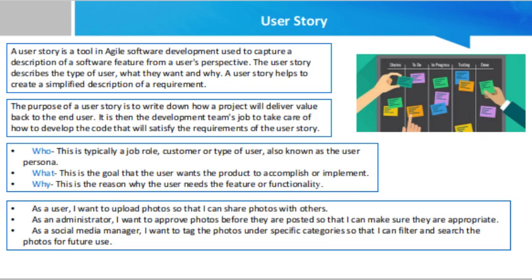What is a good user story? First, a good story is independent — you want user stories to be independent of each other so you can freely move them around your product backlog as priorities shift. Negotiable — you lay down the details of a user story in collaboration between your customer and the team that will implement it; this collaboration includes negotiating the scope of what the implementation will and won't include. Valuable — a good user story has value to the customer, which may be an internal user; without that value, there is no point in putting any effort into the story.